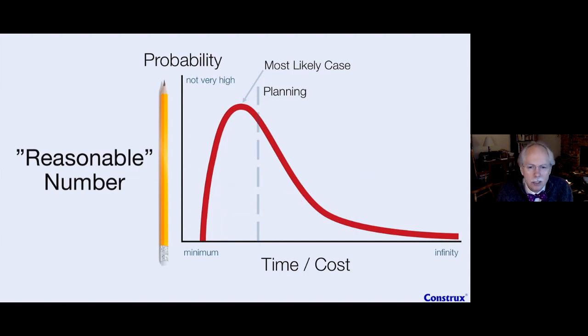So what is it actually good for? Well, it's good for a couple things. One, it's really, really good for tracking. That is, if I want to track the team, I want to track them to the planning number, not any kind of promise in the future. Remember, I suggested that if we give the team the promise number and say, well, we have to deliver by this promise number date over here, what's going to happen? They'll say, oh, look, I got lots of time. I can then polish this up. I got all these other things. I can put this off for a while because look how much time I have, right? And then next thing you know, you've blown right past your date.